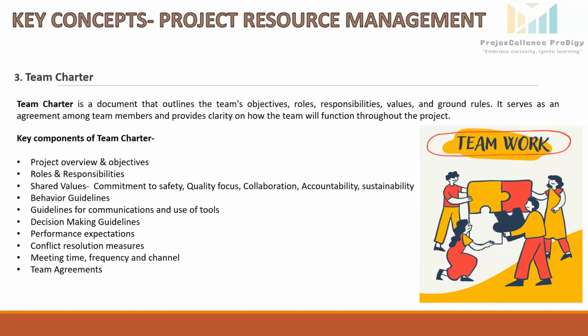Decision making guidelines will be clearly mentioned. Who will make the technical decisions? Who will approve the budget? Who will take decision on procurement and logistics related issues? And if there are any unresolved conflicts, so it will go to the project steering committee.